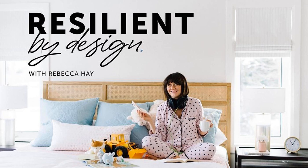Make sure you place all of those orders because then you can see, is there something that's back ordered? Do I need to reselect? And then you're not reselecting mid-reno when something else has already been installed and you realize, shoot, if I have to change that backsplash tile, I feel like I wouldn't have done this counter, but the counter's already installed, right? The more decisions you can make up front, the better.